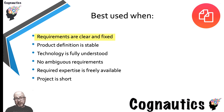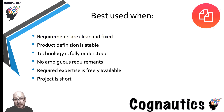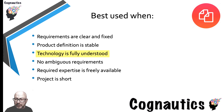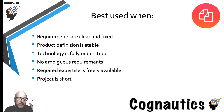So why would you use the waterfall methodology? If you know up front exactly what's involved in the project. We did the example of FIFA — with FIFA 21 they know exactly what's going to be required: new players, their kits, probably the same engine or minor tweaks, but fundamentally they know 99% of what they're going to do before they start. For a new release of FIFA, macOS, or Windows, the product definition is stable — you know exactly what you're getting into with no surprises halfway through.